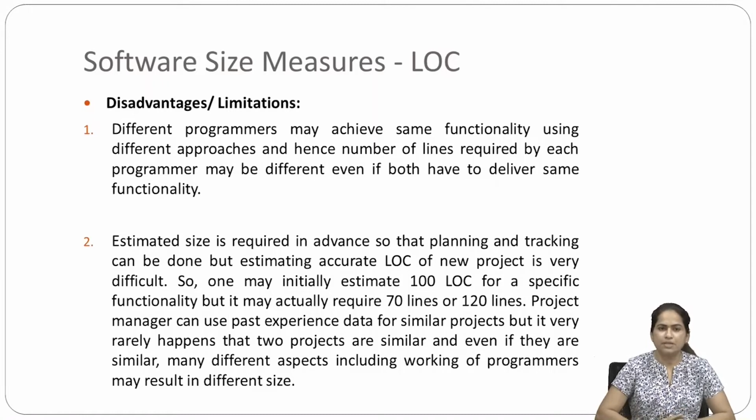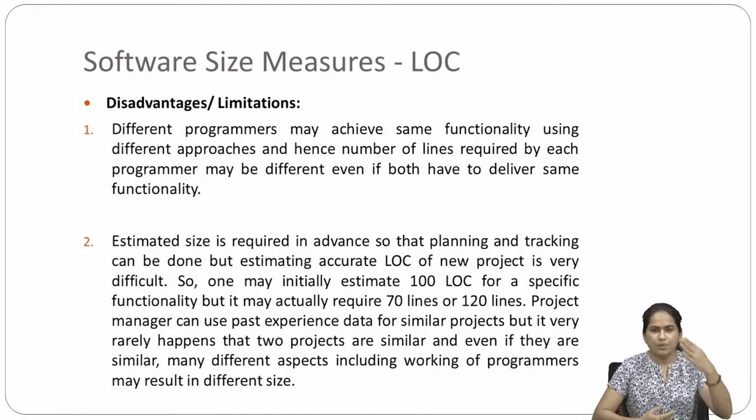With it, some disadvantages or we can say limitations are also there. Different programmers may achieve the same functionality using different approaches. Now it may happen that you have a functionality and two persons are working on it. Both may have a different way of thinking, and different logic they are applying. Ultimately they are trying to achieve the goal only, but the way they are writing is different. So the number of lines they write may differ.